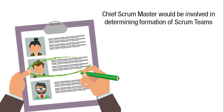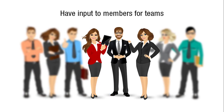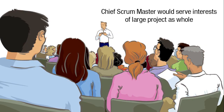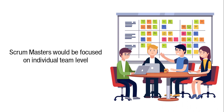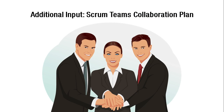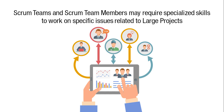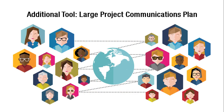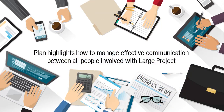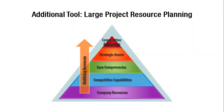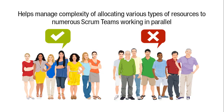For a large project, the chief Scrum master would be involved in determining the formation of the Scrum teams and have input on the members for the teams, serving the interests of the large project as a whole, while Scrum masters remain focused on the individual team level. Additional inputs include the Scrum masters collaboration plan and team specialization — some Scrum teams and team members may require specialized skills to work on specific issues related to large projects. Additional tools include the large project communications plan, which highlights how to manage effective communication between all people involved, and large project resource planning, which helps manage the complexity of allocating various types of resources to the number of Scrum teams working in parallel.